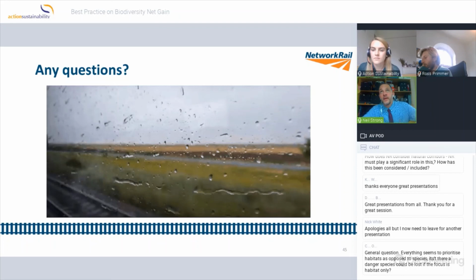When we then start to do the work at a local level, that's when we will pick up the species impacts that we may have and then tailor the work accordingly. So it's hopefully a gradation that will take us through understanding what the habitats are, and then when we start ground truthing, understanding what species are in those habitats.